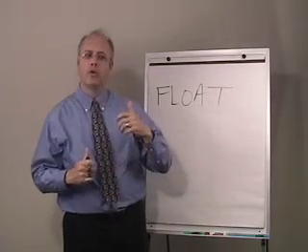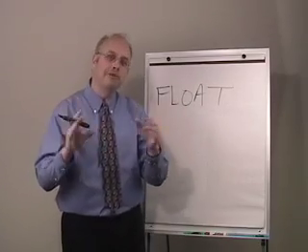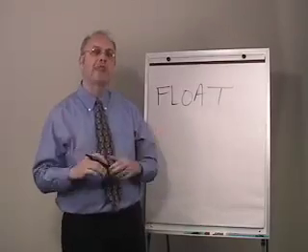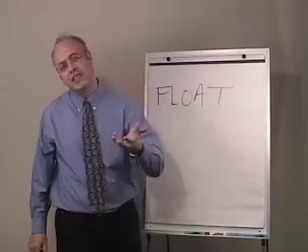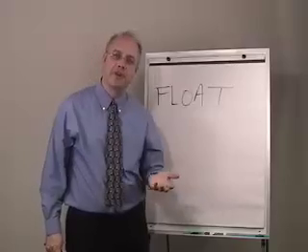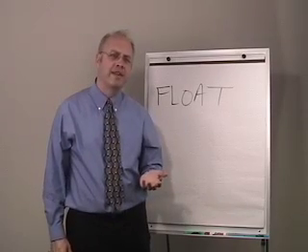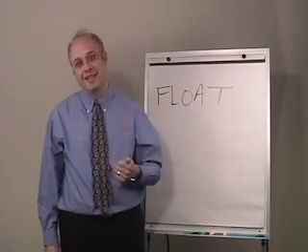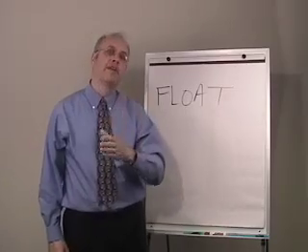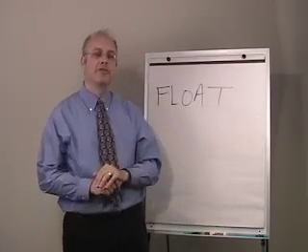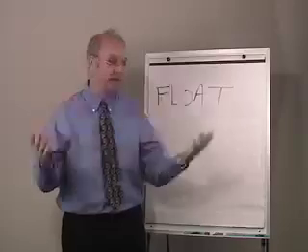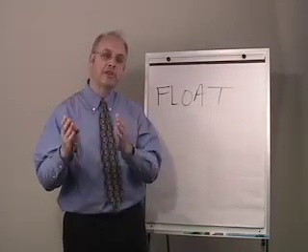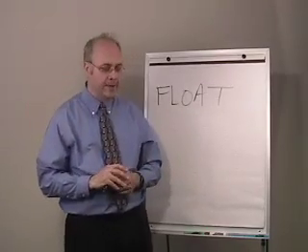Well, who owns that new float, that found float, that created float? Well, if you have a contract that's silent, it belongs to both parties on a first come, first served basis. If you have a contract that says it's owned by the project and available to both parties on a first come, first served basis, then that's exactly the circumstance. Essentially, the float's available to both parties.